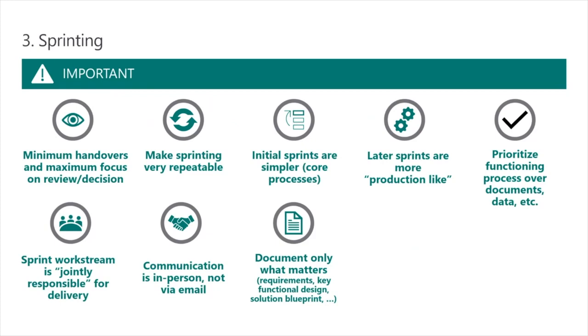Or I've got 3 things I know I need to go to the technical design board to get approval on because this design needs to get approval through them. Or I need to get the right resources defined for this very specialist task that's coming in the next sprint. Get all of that out of the way so that when the sprint starts in which that decision is needed, it's already done.